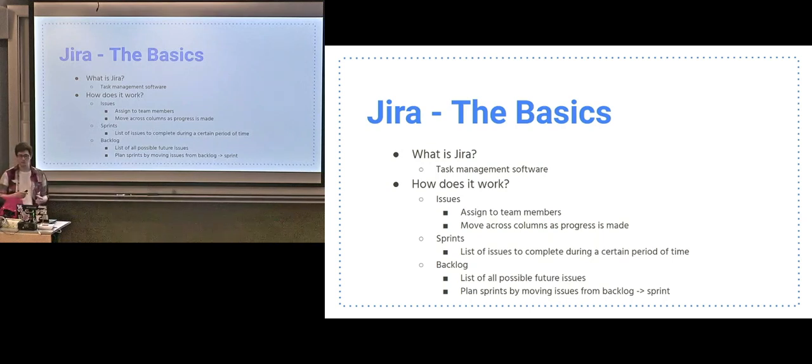And as you make progress on your issue, you move it along. We'll see in a bit, there are these different columns where we have, this has been assigned to me, I have started this, it's in progress, I think I've completed it, so I moved it to review, and then after you get approval for review, it's moved into the done column and the task has been completed.